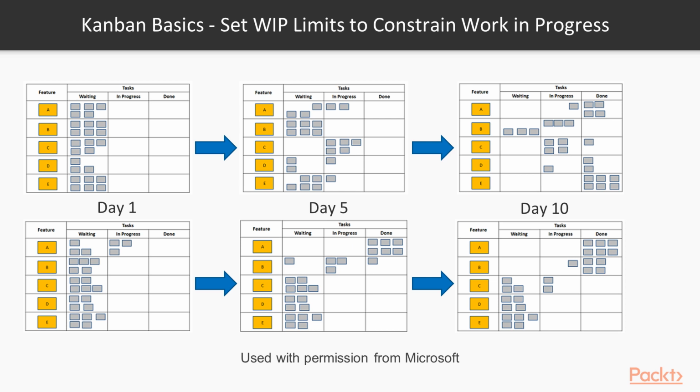How can you measure the value of what's been delivered here? Equally, because of the 2-week sprints, they've obviously not completed their work. So therefore, things are going to have to roll over into another sprint. So the estimation's kind of gone wrong. Now let's have a look at the Kanban approach, where actually they've managed to deliver that feature, which they delivered in the first week, and they've nearly completed the second high-value feature.